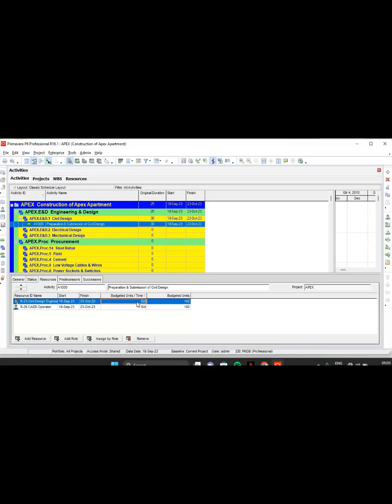He will say, we are a team of 3 and we are going to work on this civil design. So 3 means one person is working. How many hours? 8 hours. Designers work in the office for 8 hours. So there are 3 designers. So 8 ones are 8, 8 twos are 16, 8 threes are 24. So you have to put it over here, 24.